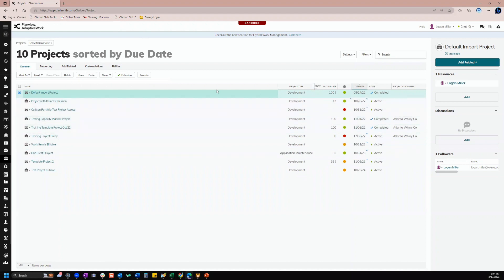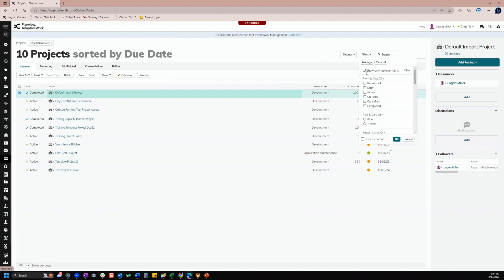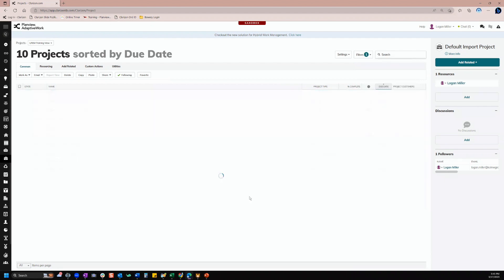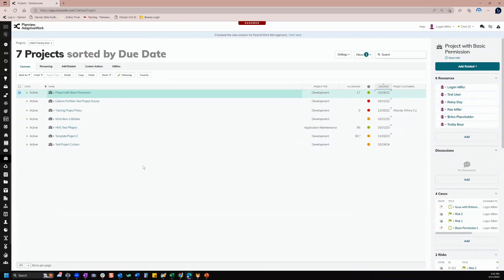I'm going to move this column to the front and apply a filter. I'll come to my filters, find the state filter, and choose active — because that's the only projects I want to see. I really don't need to work on anything else, certainly nothing that's completed, so I only want to see those active ones. I'm going to click OK, and now I have gone from 10 projects down to seven, and that's much easier to manage — especially when you have a very busy, active system. There could be 50 projects in here that I'm a part of, and that would be a lot to sort through.